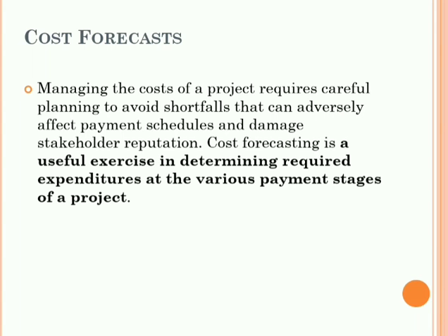The committed cost means the cost of goods and services that are ordered. The committed cost will be greater than or equal to the actual cost. For example, a contractor hires 10 cranes costing 1 lakh per month from a third party with 60 days payment terms for a duration of 12 months. The committed cost will be the actual cost for 1 month multiplied by 12. The committed cost helps in forecasting the cost of resources which are committed well in advance of incurring actual cost, like materials and subcontractors.